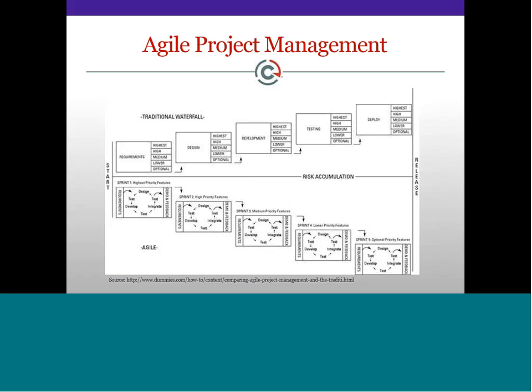When you are going to development, the design should be fixed. When you are going to testing, the development should be fixed. And then when problems arise, it rolls back and you have to change everything from the top layer to the bottom layer. That's the risk that accumulates over the period, and deployment is where all the risk comes. And that's why you have those late-night startups where everybody is trying to change everything and make it work.